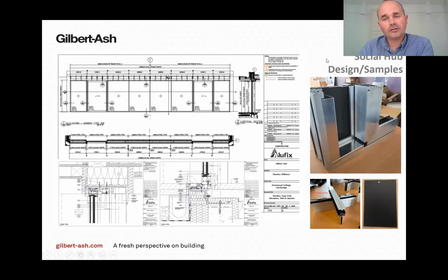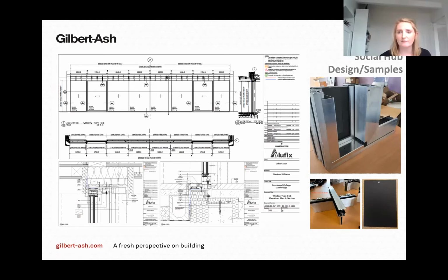Going through just on the social hub, Joanne, just there's a small section on that. Yeah, no problem. So I think as Gavin mentioned earlier, the social hub is quite a special space within the scheme. It's also one of the areas that will receive sectional completion early on in the project. So for being one of the most visually complicated or sensitive pieces to resolve, it's very early in the project. So again, early appointment of lots of the subcontractors, be it our glazing subcontractor, timber frame subcontractor, copper roofing, copper cladding, green roof, lots of different subcontractors coming together for quite intricate detailing.